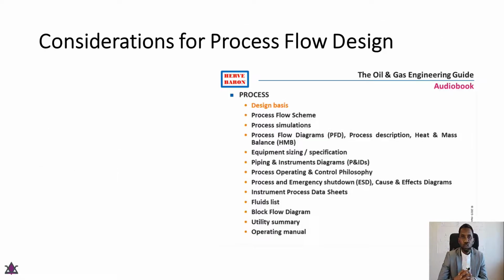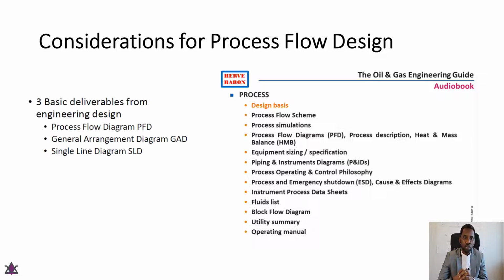So, considerations for process flow. Upon understanding the conceptual aspect of the project, when we go into the FEED stage of management of this oil and gas project, there are 3 basic deliverables that are required, one of which is the process flow design, also called PFD, general arrangement drawing, GAD, and single line drawing, SLD.